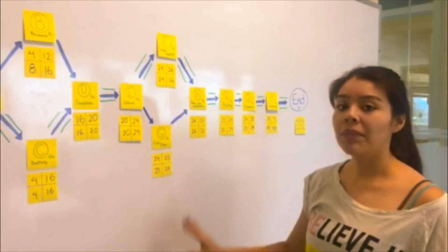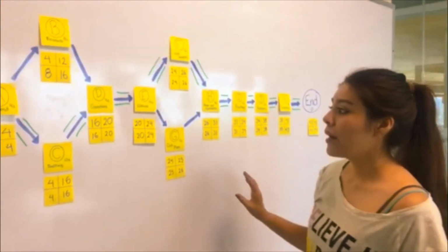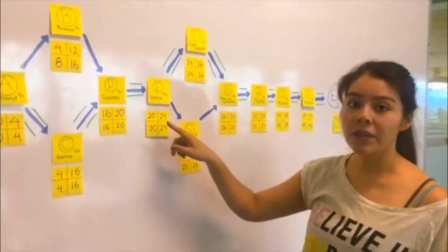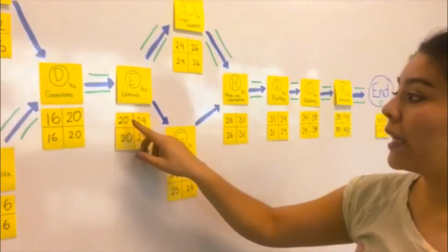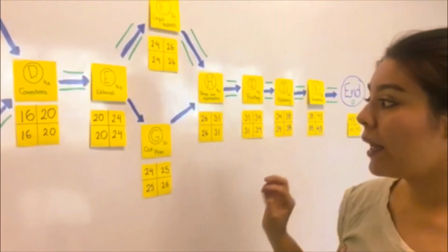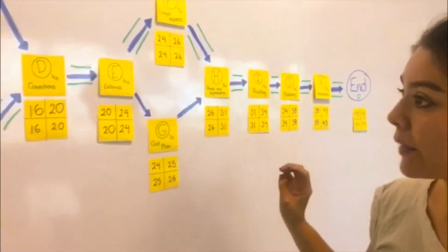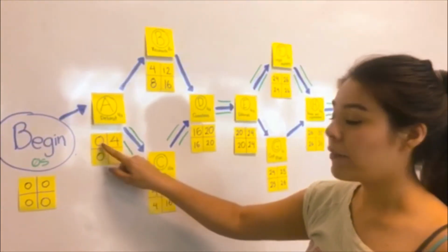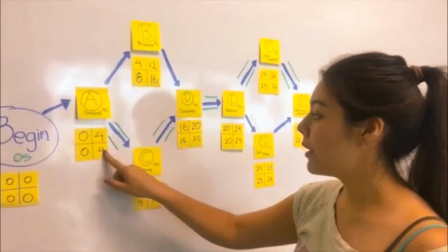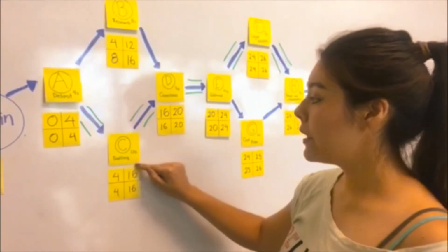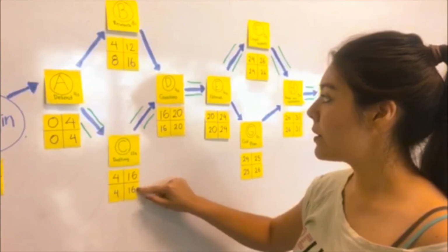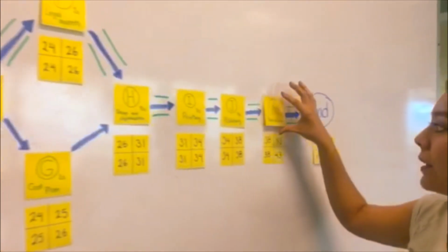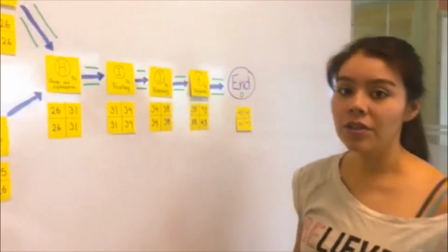Finally, now that we have completed all of our calculations, for us to choose the critical route, we're gonna look for the similar numbers in both the upper and the lower side. So here we can see that we chose the activity A because we have here 0, 0, 4, 4. Then our activity C, which has the same numbers, D, and all of our route here is the one that we are going to choose.